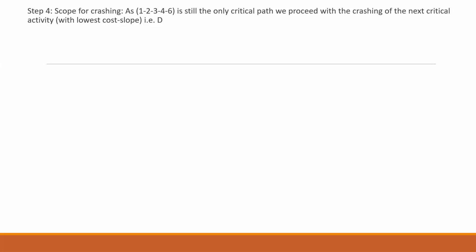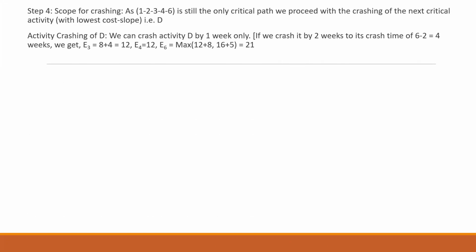But again, as I told you, you need to check whether if I crush it by 2 weeks, whether my critical path changes. Okay, it should not change. And in this case, if I crush it by 2 weeks, my critical path changes. Okay, so I cannot crush it by full 2 weeks, and that's the reason I have to crush it by 1 week.